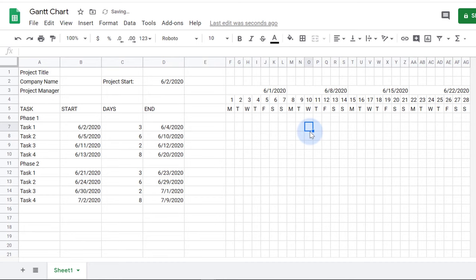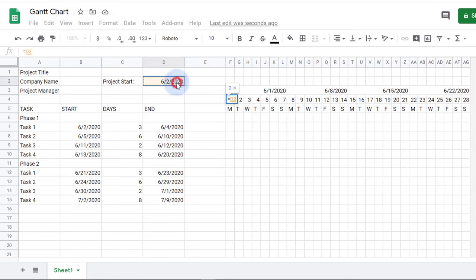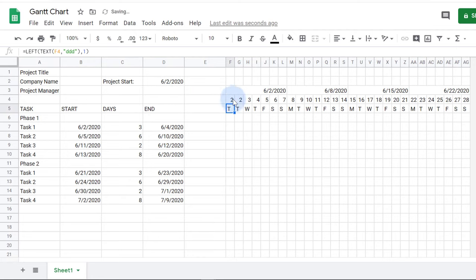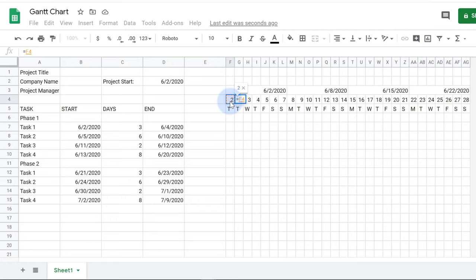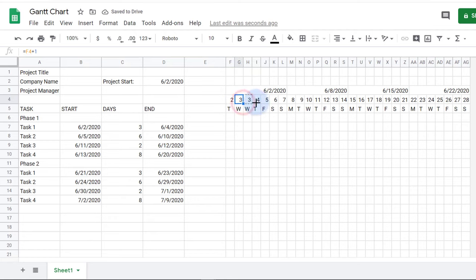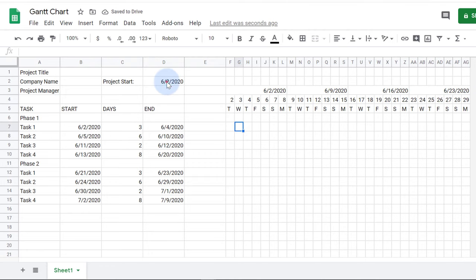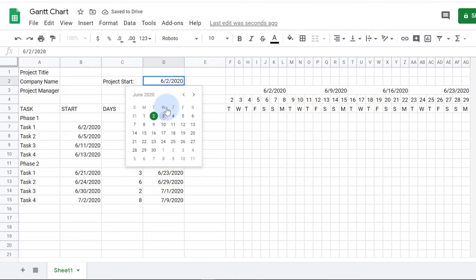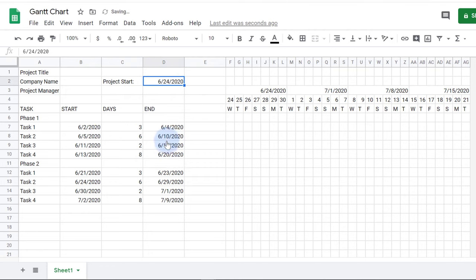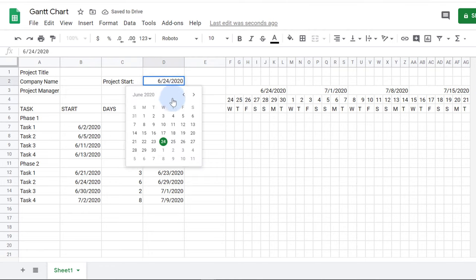To make the timeline dynamic, I'll link the first cell of the chart area to the project start date. Then I'll use a formula to add one day to each of the next dates and drag that to the right. Now when the project start date changes, the timeline will change too.